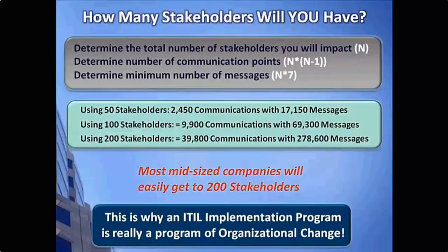One of the things I like to point out, why is this so important? For those of you that are familiar with Prince2 or the Project Management Institute here in the States, there's an old exam question on the certification exam that asks, how many times do you have to communicate to somebody before they really get the message and understand what you're trying to say? And the answer is typically 5 to 7 times. So if you just simply take that as a benchmark and you say, well, if I have, let's say, up to 50 stakeholders and I have to do 5 to 7 communications, that quickly starts to translate into thousands of messages that start to come out across the organization.